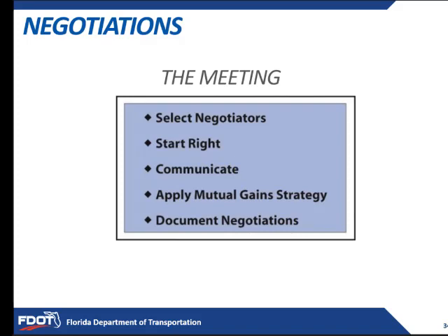Document negotiations. There will be many agreements and understandings reached during the process of negotiation. The contract and/or the scope of services should be revised to reflect those agreements. These items can also be included in the comments column in the standard staff hours estimate forms and can be used to document understandings reached for levels of effort. No gentlemen's agreements. Document all decisions.